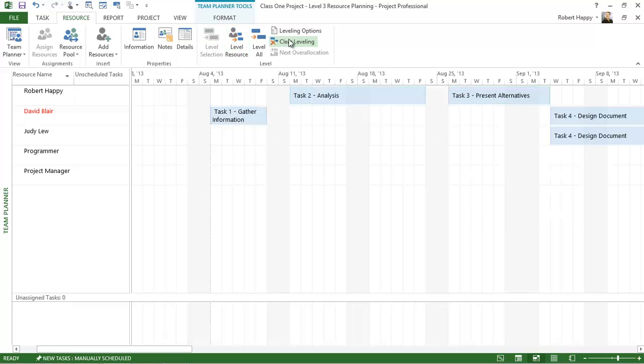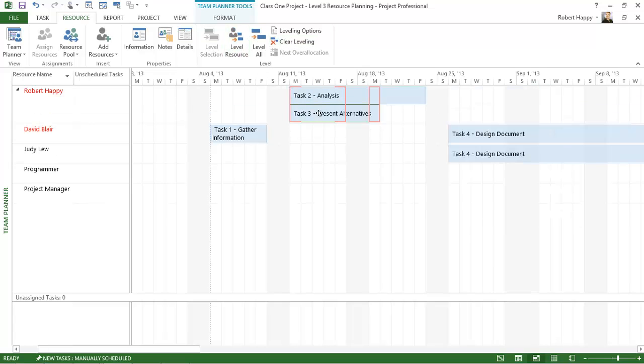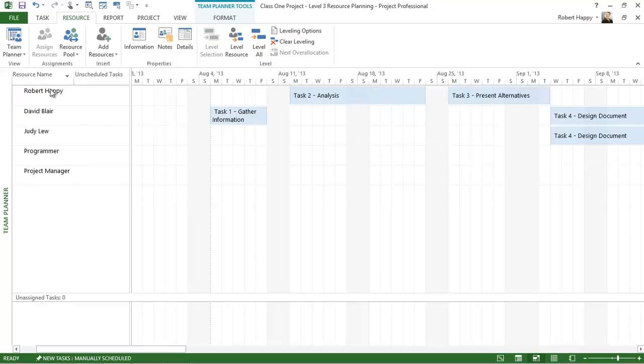I can clear leveling as well and bring that back in. I can also solve everybody's problems all at once by leveling the entire project, and that will clear up both Robert's and David's problems. But what will happen is it will reschedule those tasks to the next available date for all the resources. Of course, your schedule will get pushed out if you do have resource conflicts.